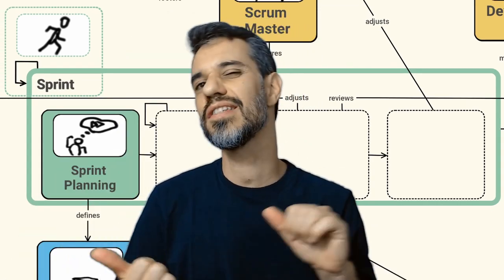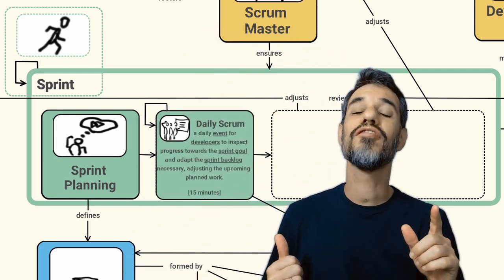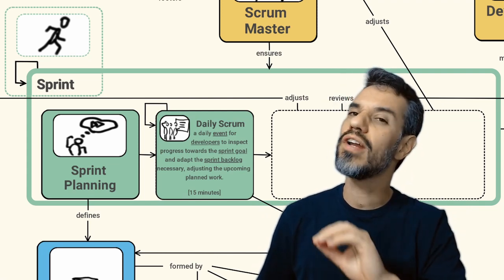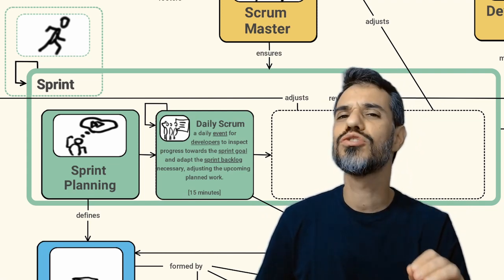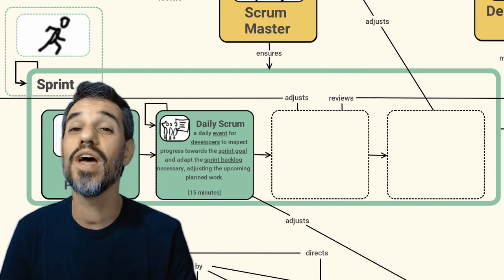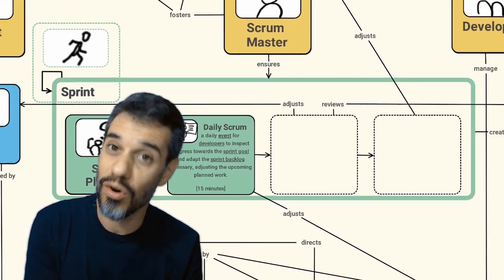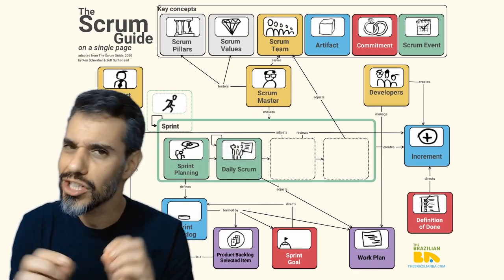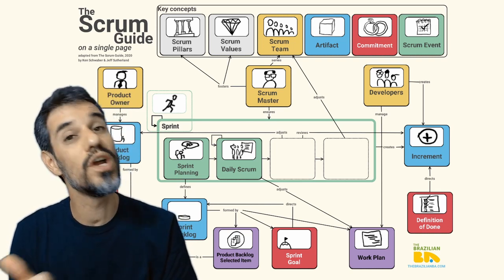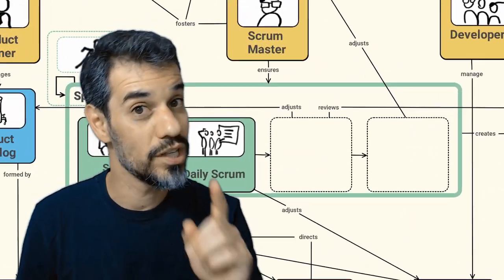Now let's take a look at the other events that happen inside the sprint. After the sprint planning we have the daily Scrum. Meetings with no more than 15 minutes that should happen every day. It's attended by the developers and they should see what's going on, what's going wrong or right, and adjust the work plan to attend the sprint backlog and guarantee that the sprint will deliver the sprint goal.